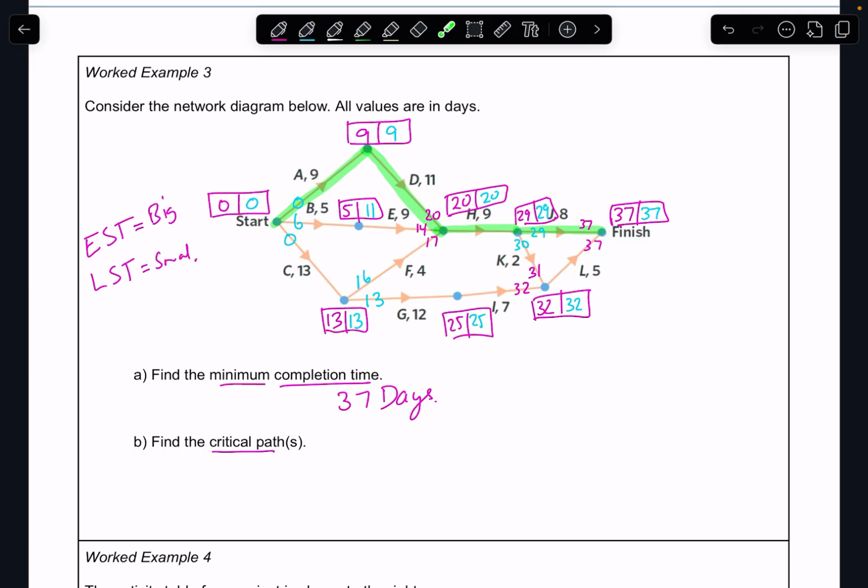Now, the reason I know there's another critical path is because I've got another 0 here at the beginning. Okay, so if that one's 6 there is not a critical path, but this 0 is. So now I need to go down and have a look this way. I'll do it with a different color. So this way here takes me 13 hours.